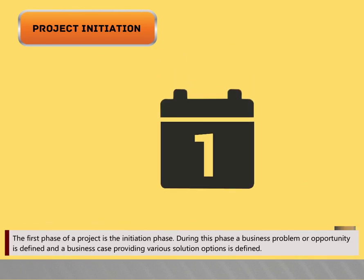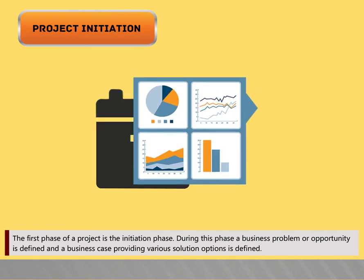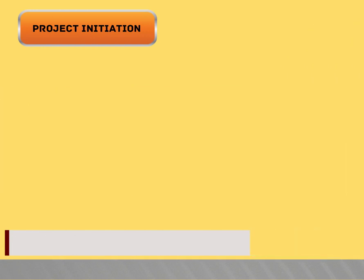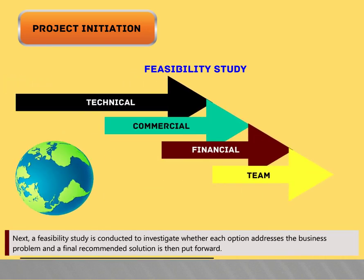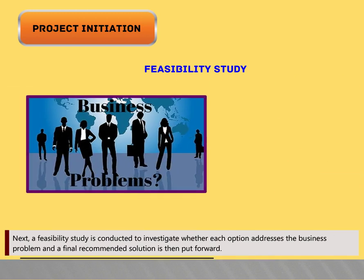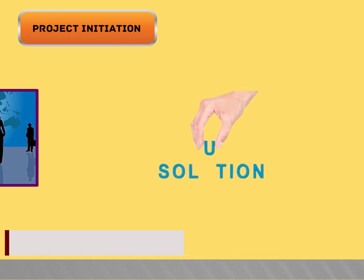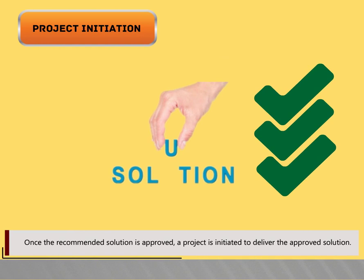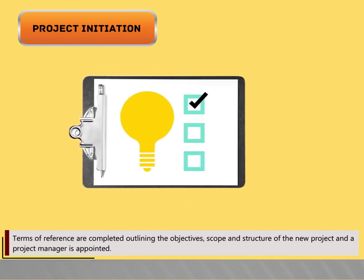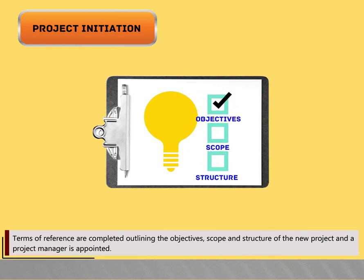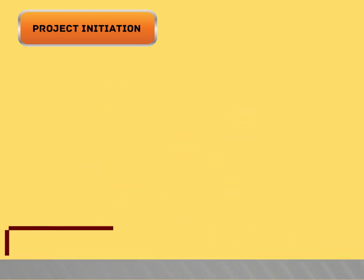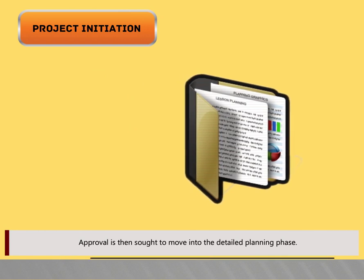The first phase of a project is the Initiation phase. During this phase, a business problem or opportunity is defined and a business case providing various solution options is defined. A feasibility study is conducted to investigate whether each option addresses the business problem and a final recommended solution is put forward. Once the recommended solution is approved, a project is initiated to deliver it. Terms of reference are completed outlining the objectives, scope and structure of the new project, a project manager is appointed, a project team is recruited, and a project office environment is established.